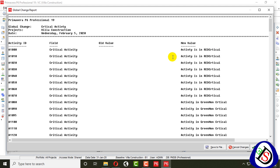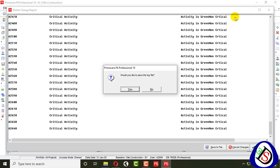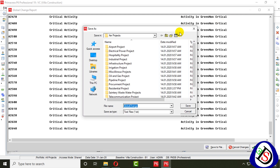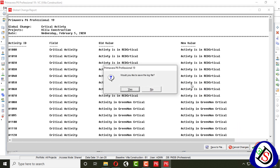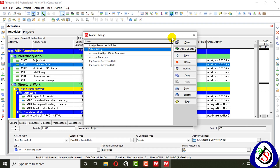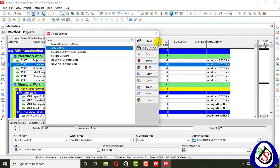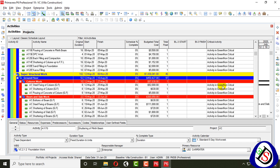Now you can see the new value: activity is 'Critical Activity in red.' We don't have any old value. Then we commit changes. After committing changes, apply changes — yes. When asked to save the log, we say no. We can close this window and see the column is now filled: critical activities show in red, non-critical activities show in green.